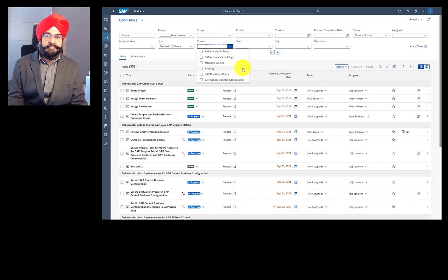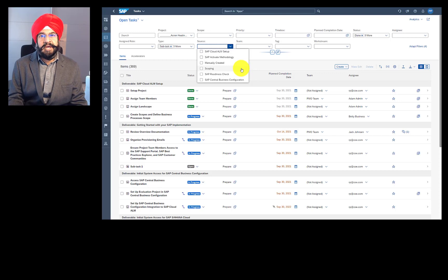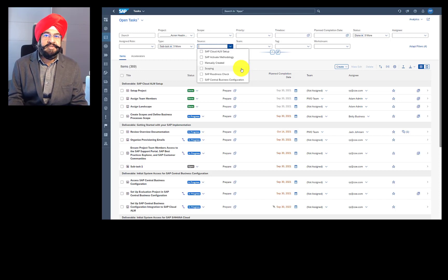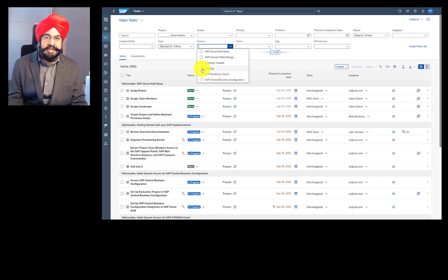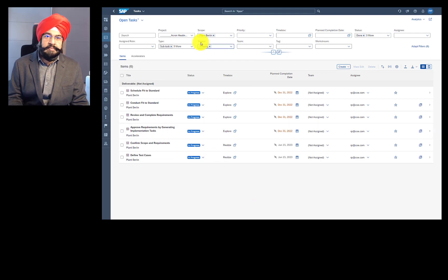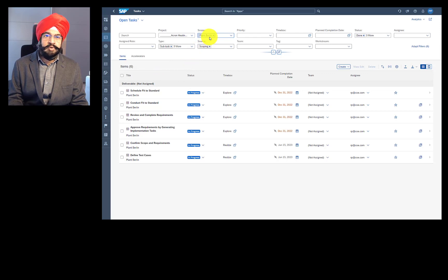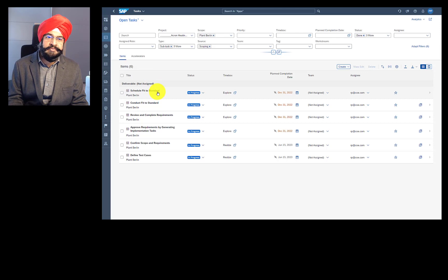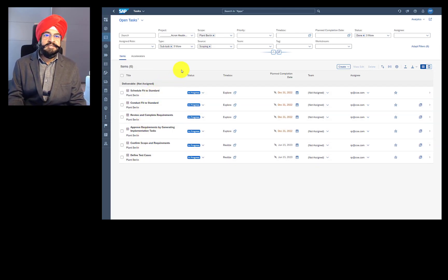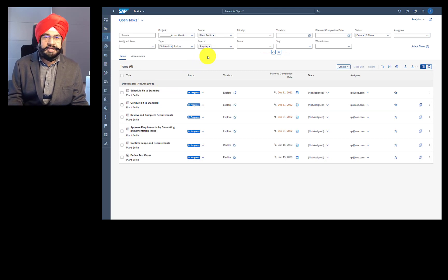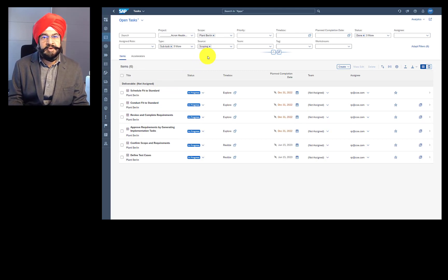What are the tasks that come via scoping? When you add a scope, then each scope helps you identify a set of tasks that are relevant for managing that scope. So let's look at an example. I have reduced my selection to a particular scope, and my source is scoping. So when I created my plant Berlin scope, then system tells me that I should schedule fit to standard workshops for this scope, I should review requirements, I should define some test cases, and this appears automatically.